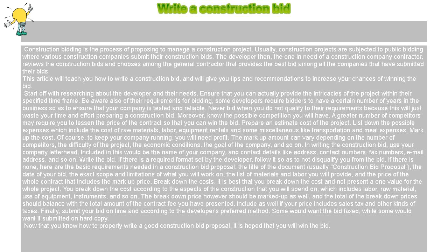If there is none, here are the basic requirements needed in a construction bid proposal: the title of the document, usually construction bid proposal, the date of your bid, the exact scope and limitations of what you will work on, the list of materials and labor you will provide, and the price of the whole contract that includes the markup price.